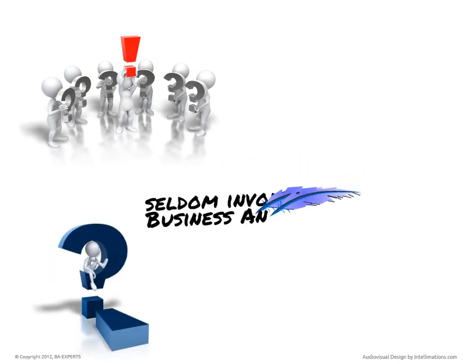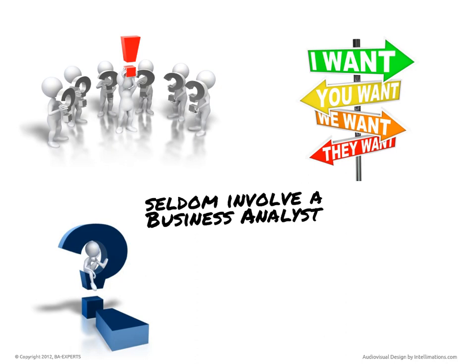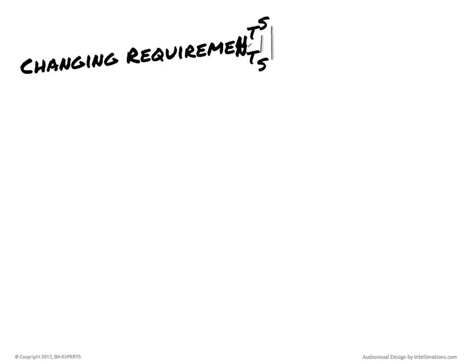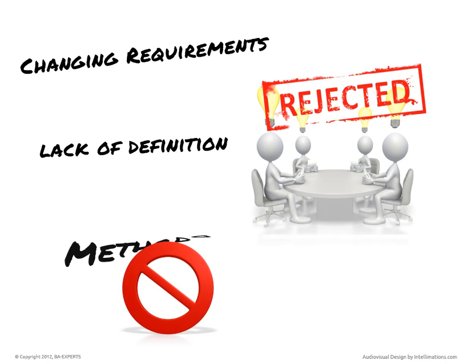Since little is known about what needs to be done when, requirement activities tend to be ad hoc, spur-of-the-moment tasks that seldom involve a full-time business analyst. Often, the need for requirements is not obvious until a fully developed solution fails to meet the customer's needs. Changing requirements often lead to considerable unscheduled rework in this approach, as the customer rejects one solution after another. Due to its lack of definition, this approach is seldom referred to as a methodology.